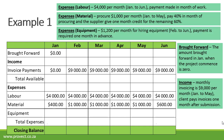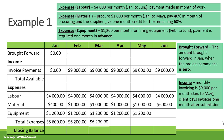For equipment, the hire cost is $1,200 per month. We start hiring in February up until June, and payment is required one month in advance. Therefore, for hiring in February we need to pay in January, and for hiring in June we pay in May. Total expenses for January: $4,000 + $400 + $1,200 = $5,600. For February: $4,000 + $1,000 + $1,200 = $6,200 — the same for March, April, and May. In June: $4,000 + $600 = $4,600.